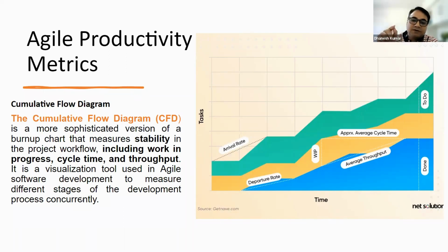So you have to understand these peaks and valleys, and how parallel or expanding the bands are, or basically how they are coming together. You have to understand whether it is becoming narrow, becoming a bottleneck, and all those things can be translated from CFD, and we can do it even individually through understanding of the different metrics.